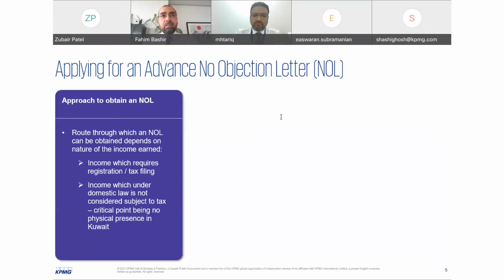Clearance certificates for Kuwaiti companies are obtained at the beginning of the year. It's a separate process whereby, because they are Kuwaiti companies, they are issued this tax clearance certificate as a blanket. This way they can present it to their customers on a general basis and have a copy, so that they don't suffer retentions on their payments.